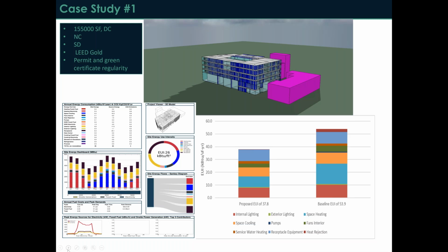So it was very important that even when they decided, for example, I remember they wanted to change one piece of glass on a south face and they didn't know what to do. So energy modeling helped them at the CA phase, because if they had bought that glass, installed it, and then changed it, it would have been costly for them. We helped them decide to change the type and brand of the glass in that specific section.